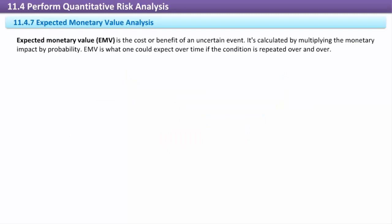Expected monetary value analysis. Expected monetary value EMV is the cost or benefit of an uncertain event. It's calculated by multiplying the monetary impact by probability. EMV is what one could expect over time if the condition is repeated over and over.